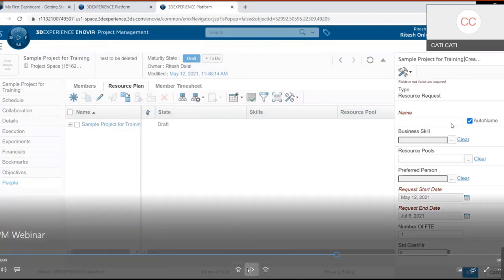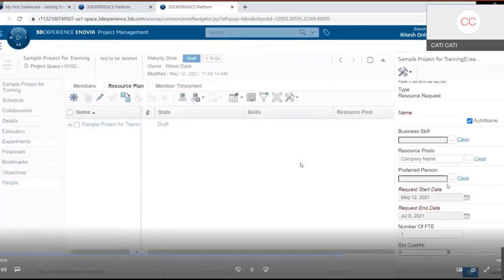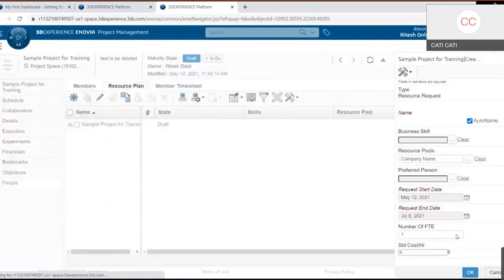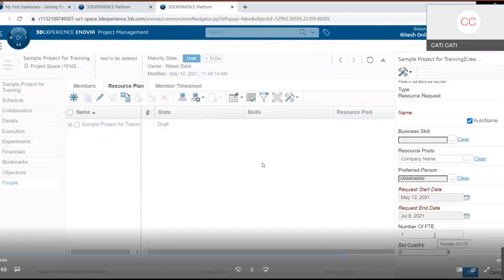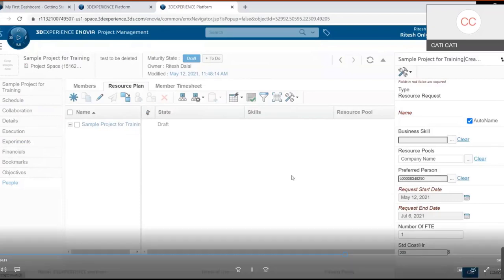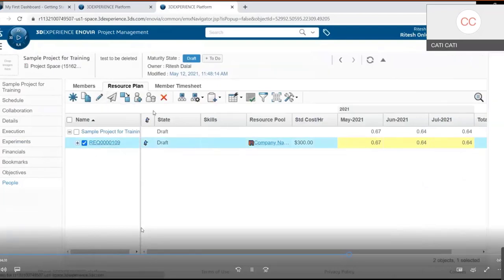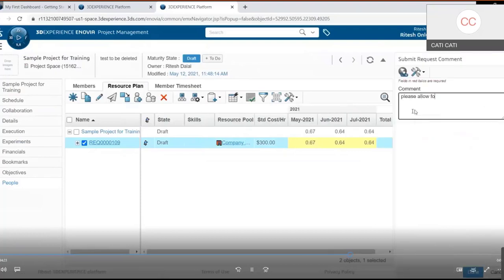In the Resource Plan, you select what skills are needed for the project. Clicking the business skill icon shows available skills. You select a preferred person, set a start and end date, enter the number of full-time employees (FTEs) requested — for example, one FTE — select the person, and set their standard cost per hour (e.g., $300/hour). After clicking OK, the resource request is created, and you submit it with a note such as 'Please allow us to use this resource for the project.'